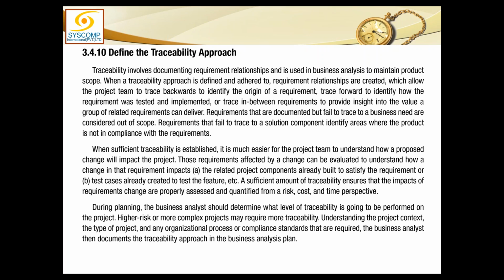When sufficient traceability is established, it is much easier for the project team to understand how a proposed change will impact the project. Those requirements affected by a change can be evaluated to understand how the change in that requirement impacts the related project components already built to satisfy the requirement or test cases already created to test the features. A sufficient amount of traceability ensures that the impacts of requirements change are properly assessed and quantified from a risk, cost, and time perspective.